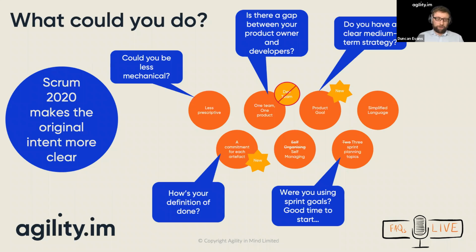I think one of the things about a sprint goal is that it especially guards against that anti-pattern where you've got a Scrum team, but actually all six or seven people are just working on their own thing. Each individual is working on their own specific client projects, and maybe each person has two or three things to get done that sprint. Some of the language in the Scrum guide now very much encourages not just whole team accountability, but whole team goals. The fact that a whole team really is trying to do the same thing within a sprint. I've always thought that's really powerful. I'm glad to see it's got a rightful place there, as you say, an elegant solution to where it fits into the framework.